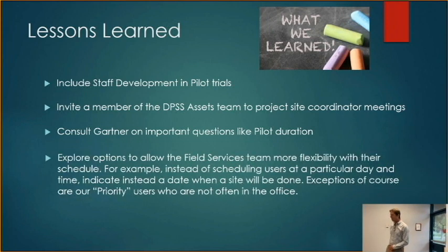Another one, explore options to allow the field services team more flexibility with their schedule. What this basically means, this is a lesson learned not from this project, but from the mainline RCIT Windows 10 project, where they're giving more of just a date for a site, right? And that gives them the flexibility to move in and out.